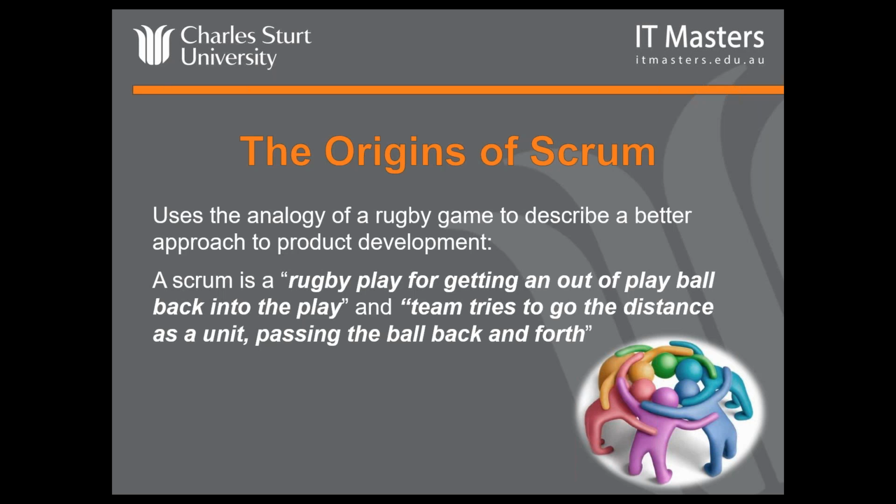So key characteristics of Scrum is that it's iterative and incremental. It utilises what's known as cross-functional teams, so people with all the skills that we need to produce an incremental release, and that's known as a sprint. Those teams are self-directed and empowered, and that work is facilitated by the role of the Scrum Master, which is why it's such an important role. And the work that they do is organised by something known as a product backlog, which is reprioritised for every sprint. And again, we're going to talk more about the product backlogs in week 3.